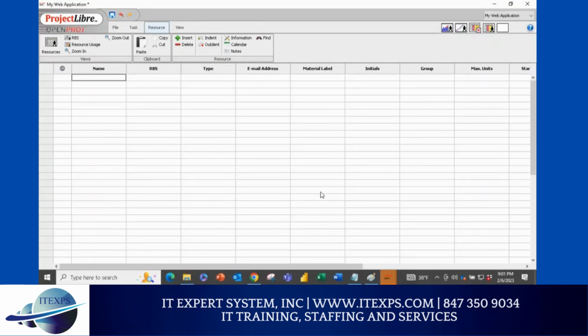Please pay attention. So right now, let's say I add Dev, QA, and an architect. So I specified 3 groups: Dev, QA, and architect. Now, please understand, if I go further here, max unit. 100% means 1 person.